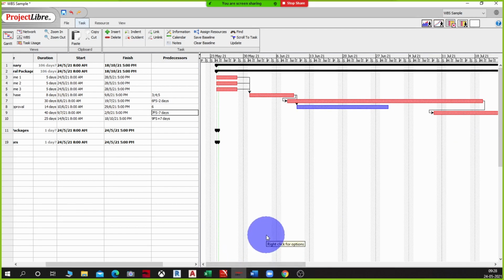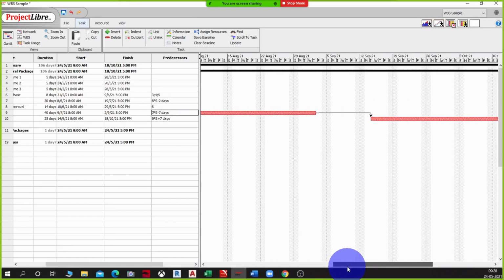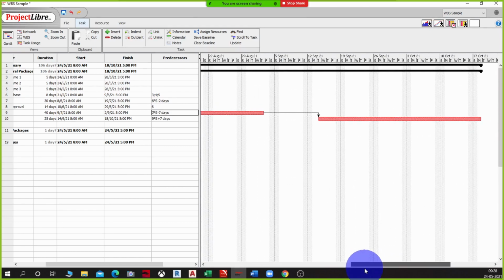The other activity you have shown has 7 days in advance for your working drawing. It is having a float of almost 7 days, right? No, it is not a float. I am putting an activity constraint. So this activity cannot start until 7 days is over.